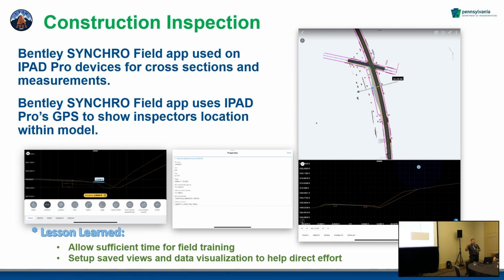So make sure with those construction inspectors, you're engaging them. One thing we did to help with that is we put a partnering item in all of our projects after that, because that's the only option we have. We don't do CMGC in our organization. So that was our only way to engage them and pay them for the time that they would talk and come to the table in some of these pilots. We wanted their feedback. We wanted to know, hey, what do you want to do? How do you want to use this? How can we help you?